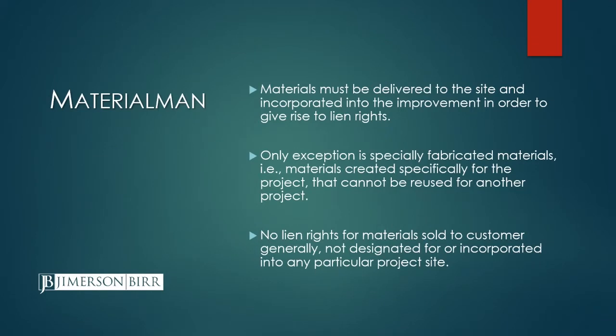That is a rebuttable presumption, meaning the owner could, if it could come up with evidence to show that, notwithstanding the fact the materials were delivered, they weren't actually incorporated, rebut that presumption, but it's harder for the owner to do that. And generally, proof of delivery is what a supplier is going to need in order to proceed with its lien on materials delivered to the job site.